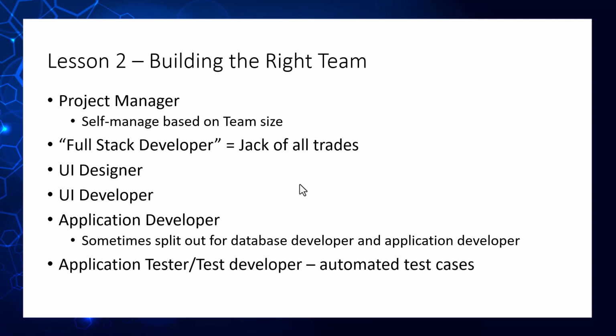It's important to know that if you have a big team size like 10 developers or 15 developers, it's going to be a job in and of itself to manage the team. So, once you start getting over a few different team members, you may want to just hire the project manager. But if it's a smaller team, one developer, two developers, you may want to choose to self-manage and save some of that budget as well.